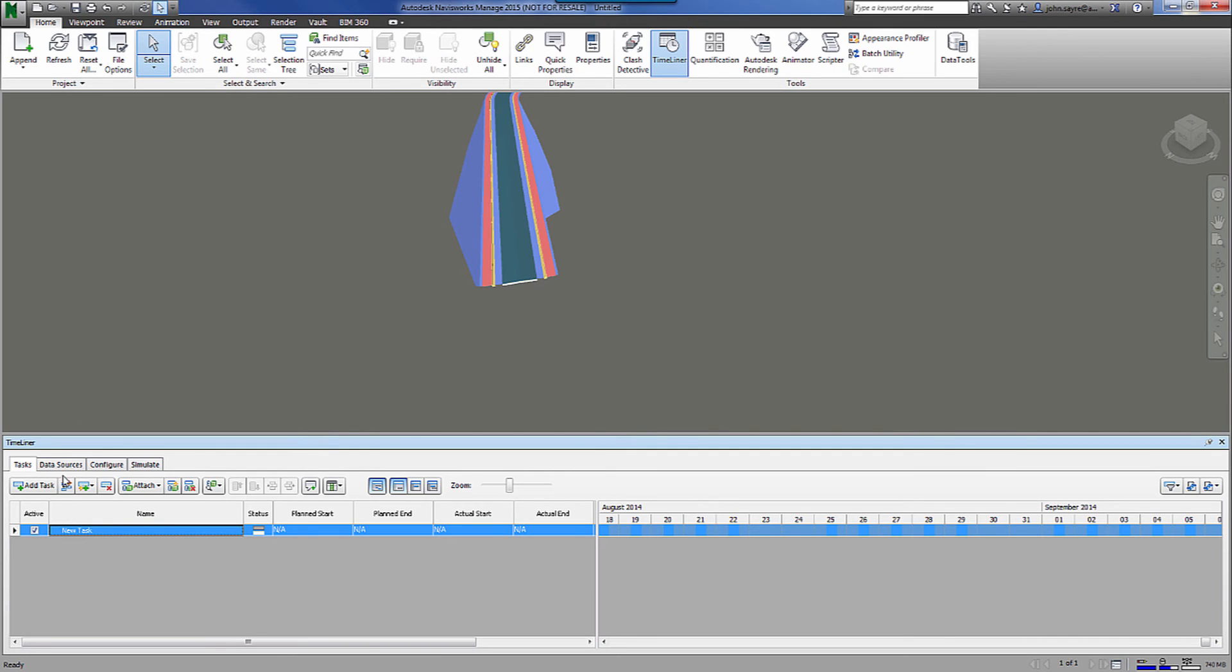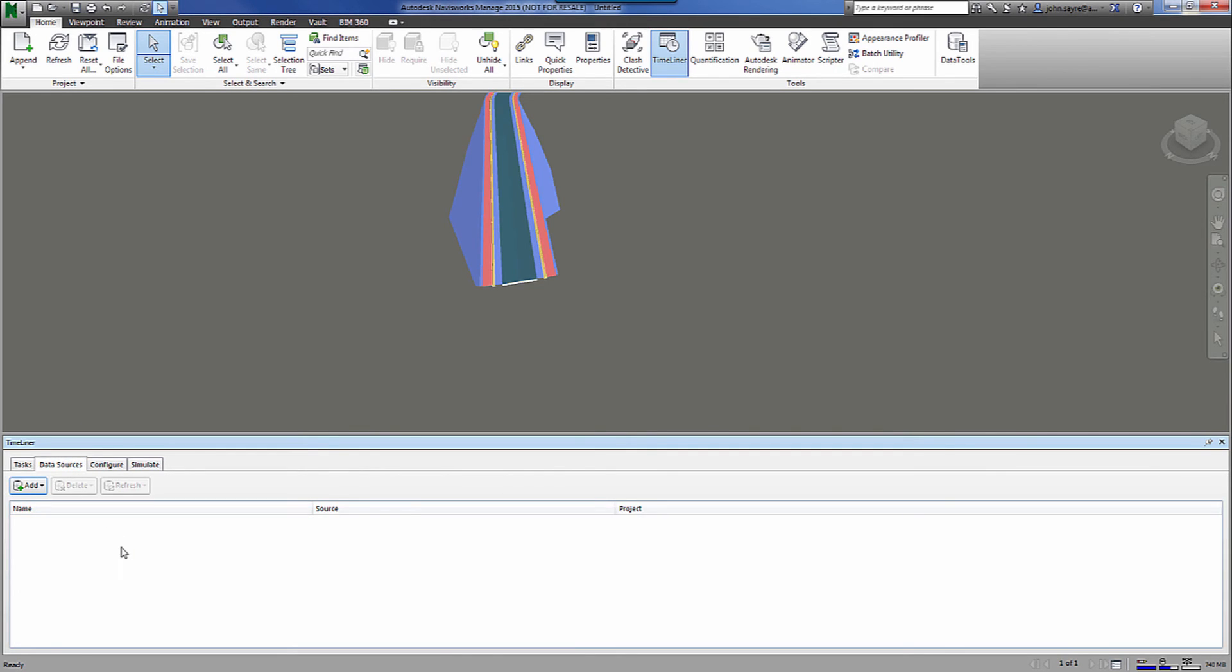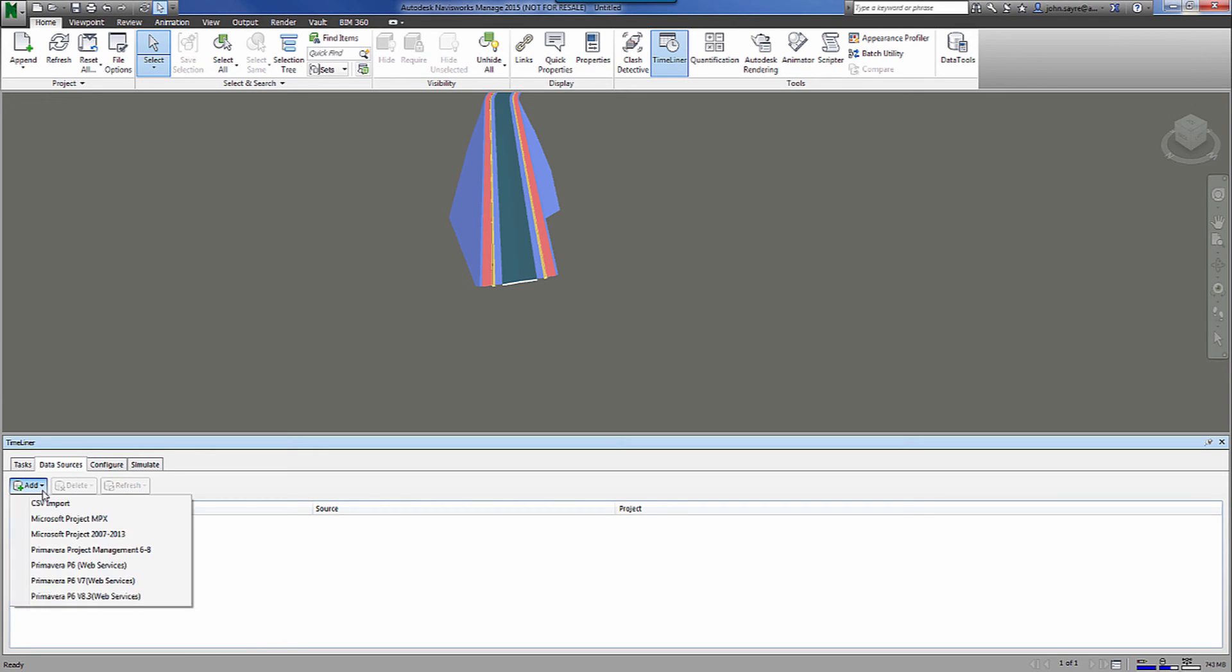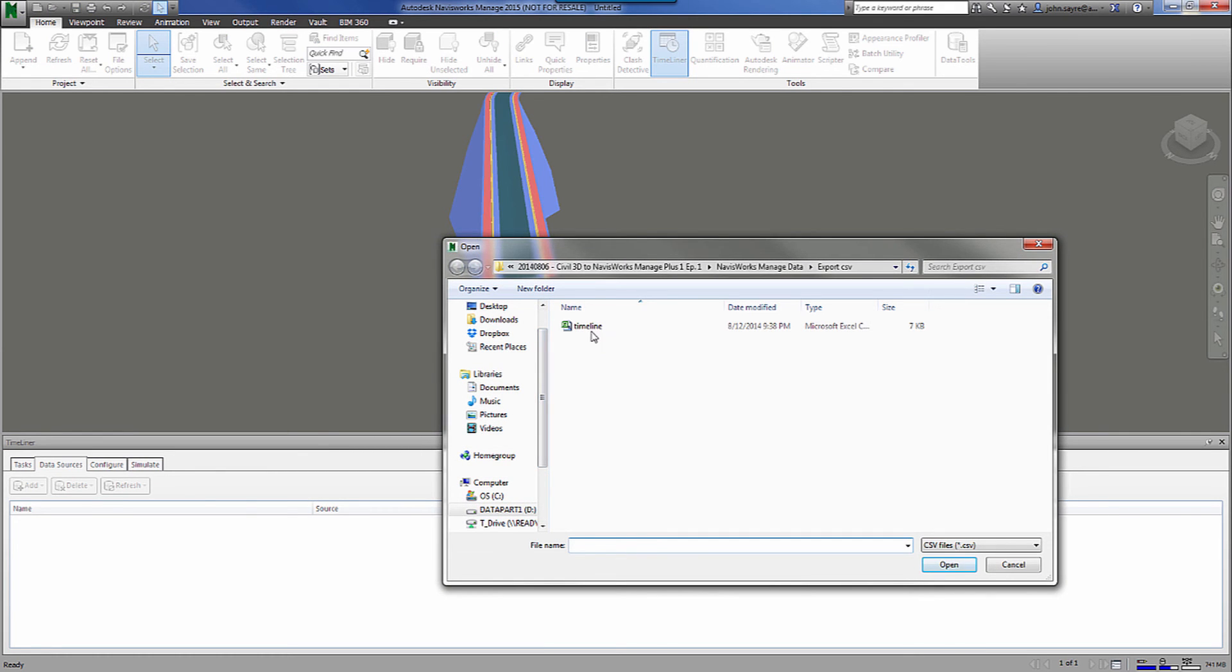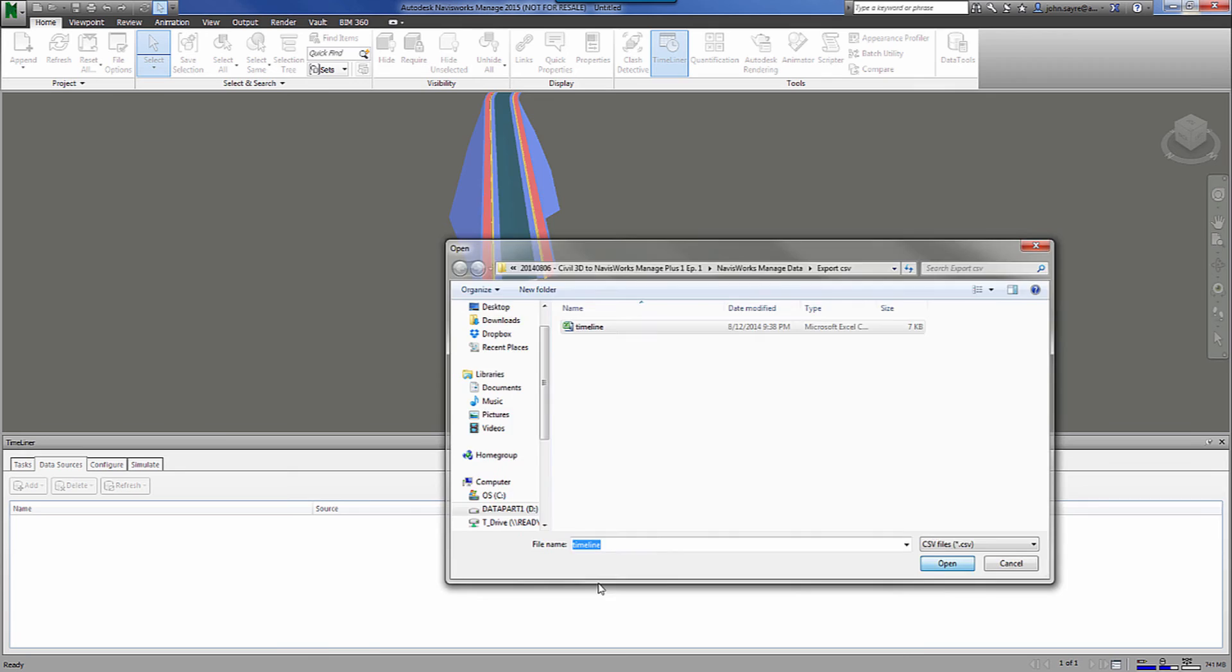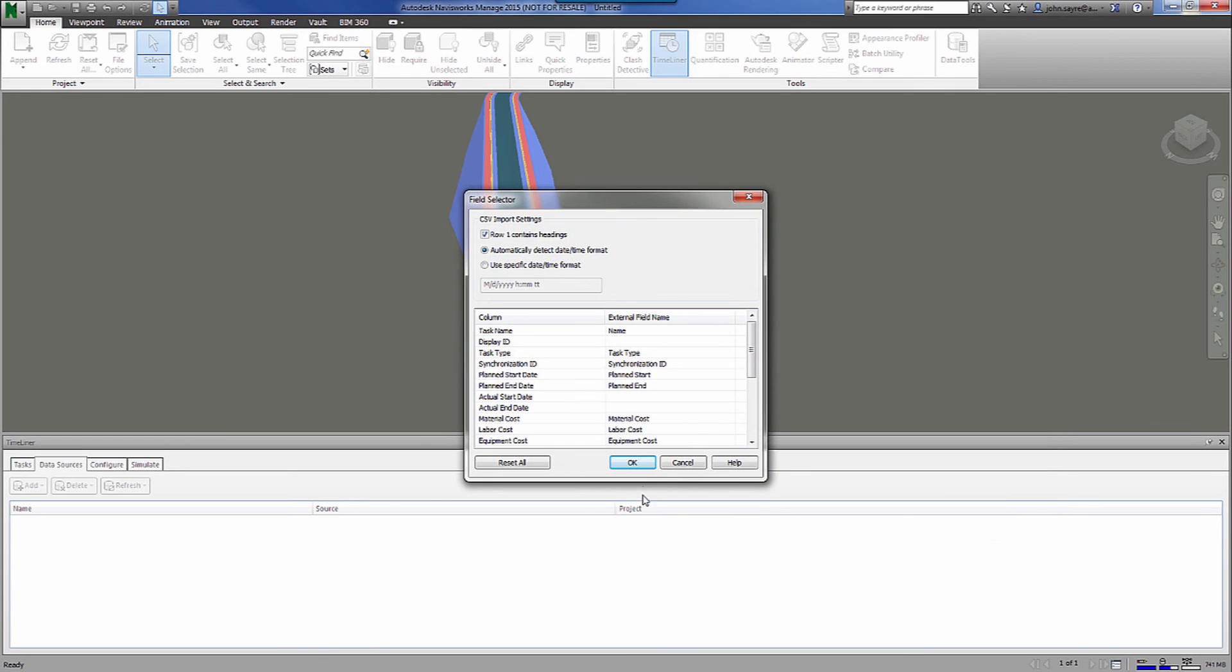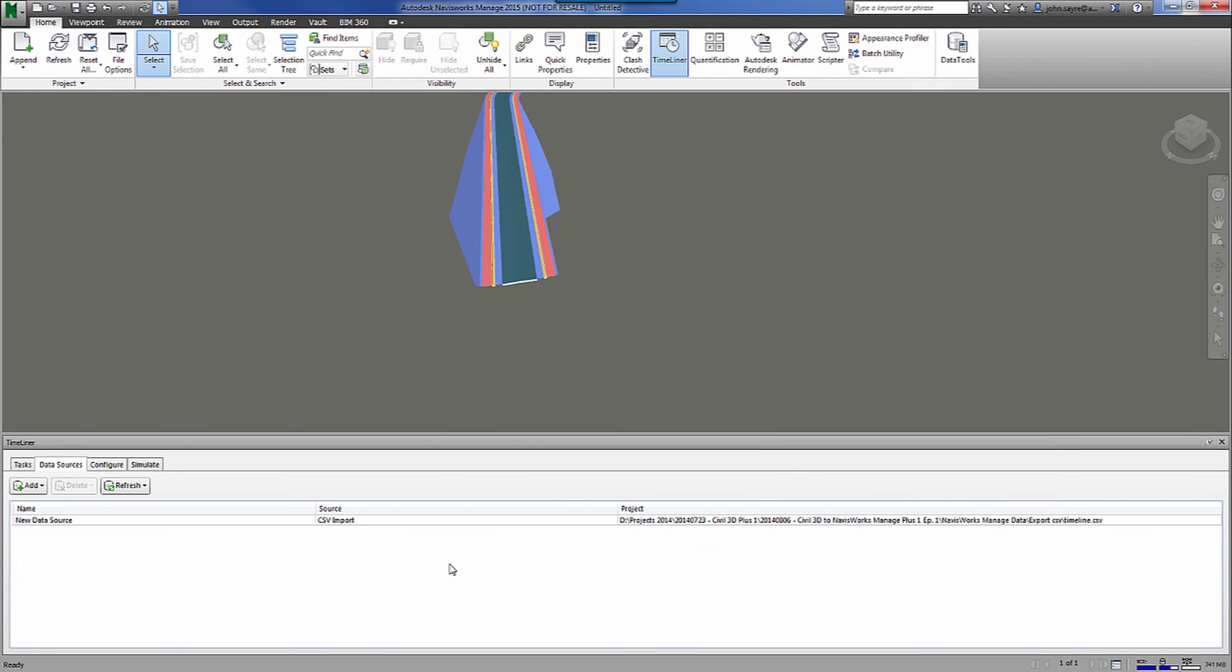What we're going to do is we're going to actually attach a data source which will be our Gantt chart. And we will match these corridor solid pieces that came in up to our Gantt chart so that we can show a simulation in the Timeliner. When I select add, you can see that there's several different types of files that we can add. So we've got CSV import. We can also bring in some Microsoft project files or Primavera files. We're going to bring in the CSV. I'll select my timeline. I'll hit OK.